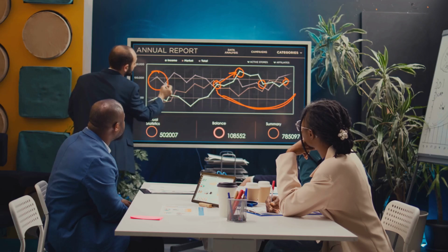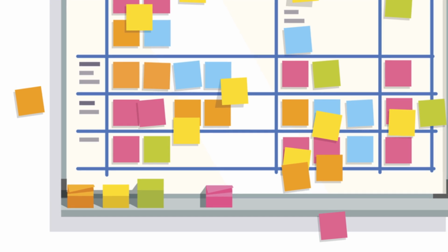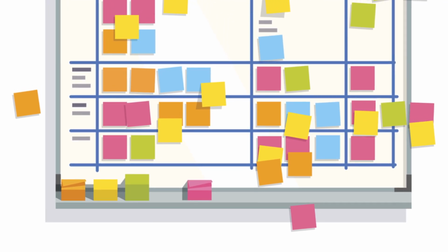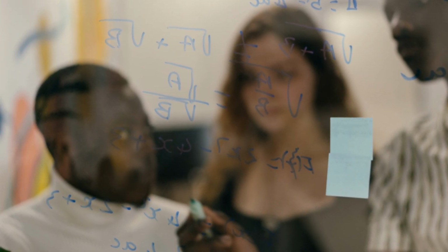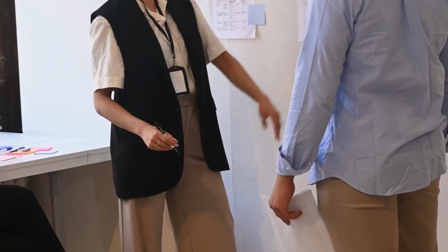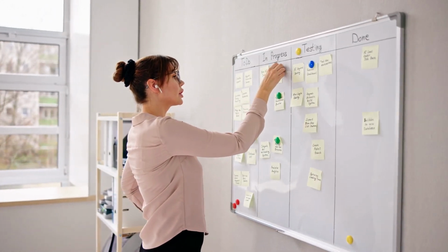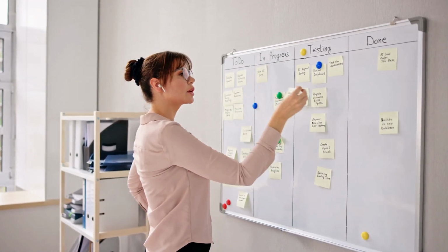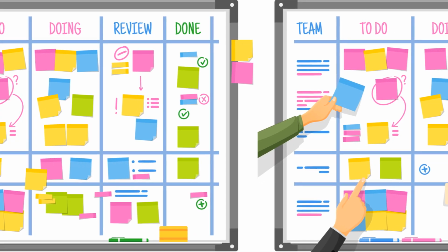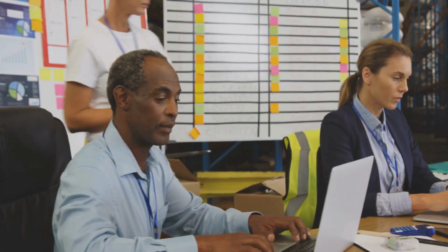When a spillover occurs, it is crucial for the team to address it during the sprint review or retrospective. First, the team should re-estimate the remaining work for the spillover story. This helps to assess how much effort is left and whether the story needs to be broken down into smaller, more manageable tasks. The team may also reprioritize the spillover story based on its importance and urgency in relation to other stories. If the story is still a high priority, it should be moved to the top of the backlog for the next sprint. However, if the business needs have shifted, the story might be deprioritized or even removed entirely.